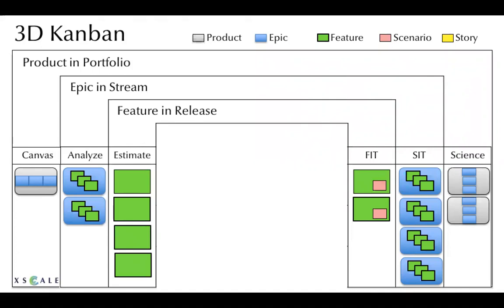We have to be able to take these features and get estimates, not just of the budget required to deliver the feature, but of the business values of the features, so we can do an ROI prioritization. Now, a lot of people in the audience may be familiar with WSJF, cost of delay, prioritization, and so on, CD3. There are some problems with those. What we like is to start with an ROI-based prioritization and then discreetly bring in cost of delay issues, and we can talk about how we do that later on.